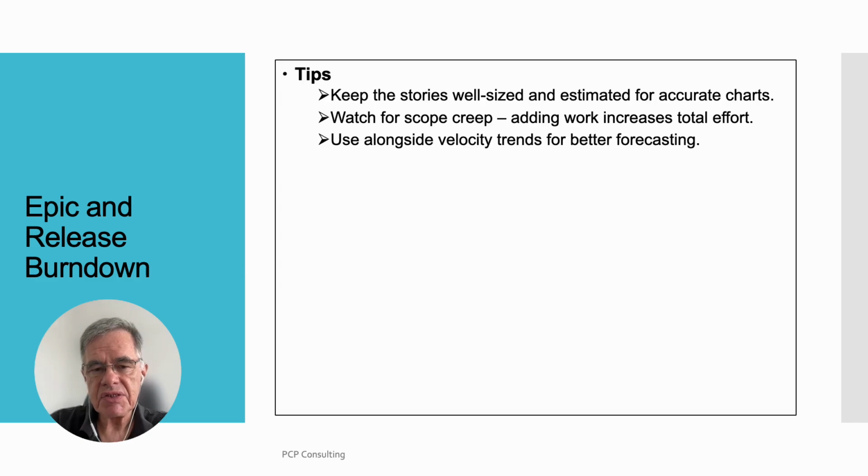Tips: keep the stories well sized and estimated for accurate charts. Watch for scope creep. Adding work increases total effort. Use alongside velocity trends for better forecasting.